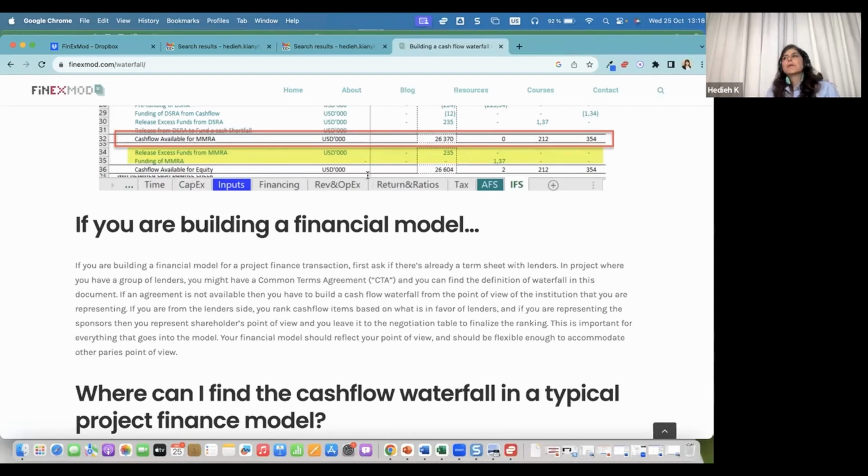You see, the funding, I mean, these actual CapEx items, yes, they are actually senior to debt service. The CapEx item, yes, it is in the cash flow waterfall. It comes at the same ranking as OPEX. However, because you're funding it with the reserve account, you basically cancel them. You know what I mean?